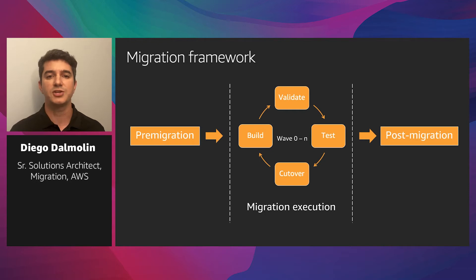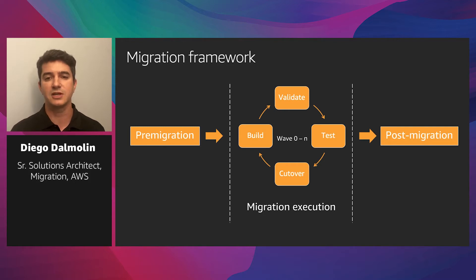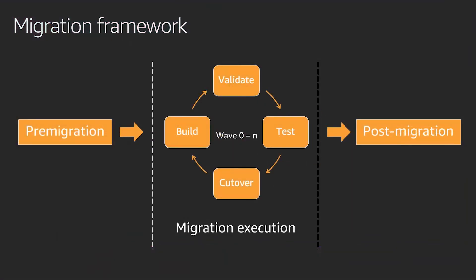Then we start the migration execution phase. It's when you apply the migration strategy defined in the first phase by building a migration pipeline, validating the assumptions, testing the application running in the new environment, and finally cutting over the migration. The lessons learned during the first migration waves will be used to improve the process and keep the migration momentum. Finally, there are some post-migration activities such as notifying users and application owners, or installing new tools to support the cloud environment.